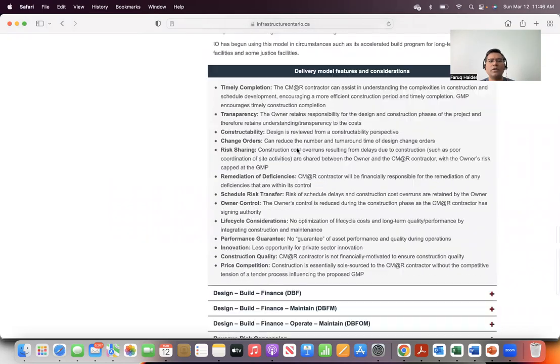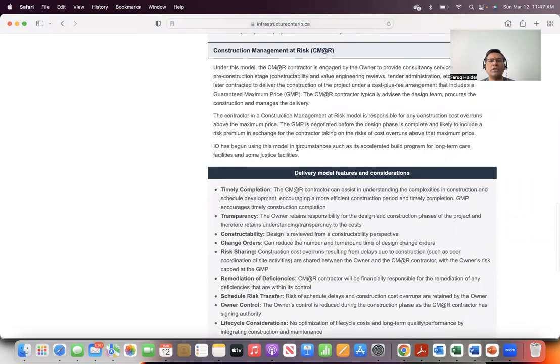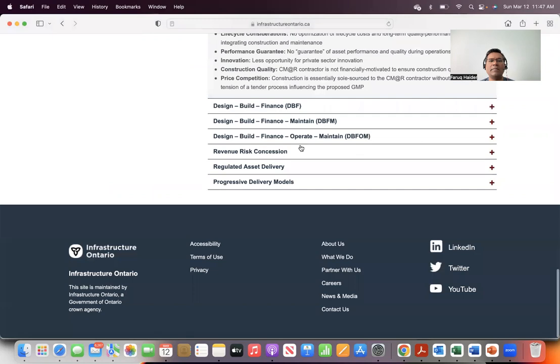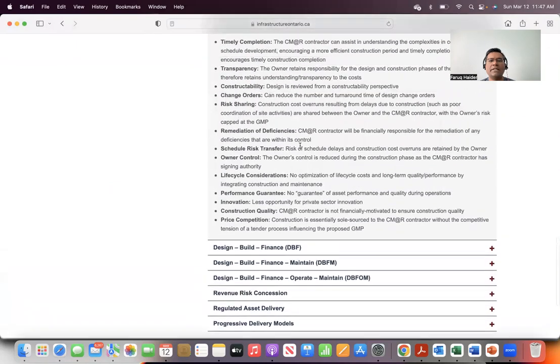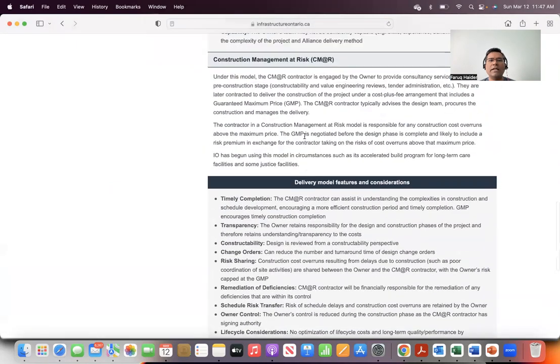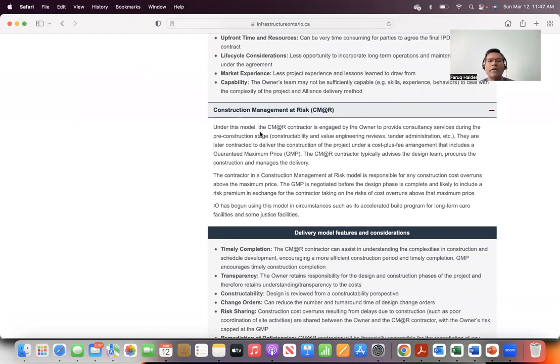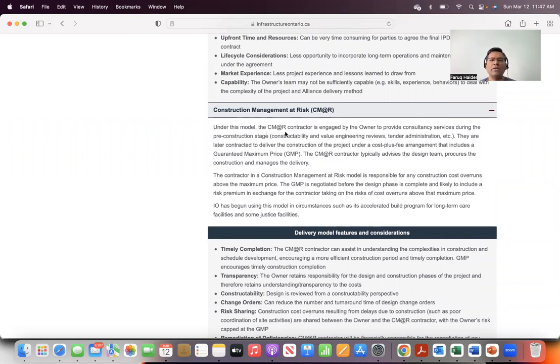One of the projects that Infrastructure Ontario is currently pursuing using this model is one of these. As it mentions here, under this model, the CM at R or Construction Management at Risk contractor is engaged by the owner to provide consultancy services during the pre-construction stage.